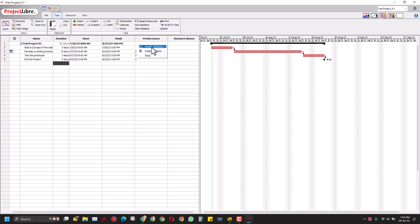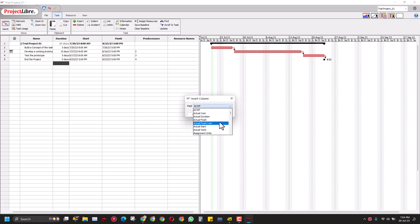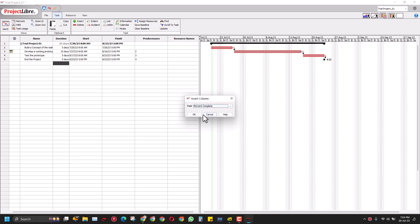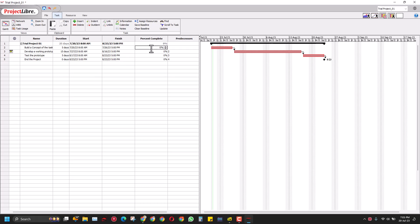Press insert column and here I can add a progress section, which would be really good to show you how this works. That is the percent complete. Let's say I open this project library file two or three days from now, and the concept part is almost 50 percent complete. You can see that now there is a black bar chart entered into this task main bar chart. That's how you're going to monitor the progress that you have achieved in this project library. This was a very simple session.